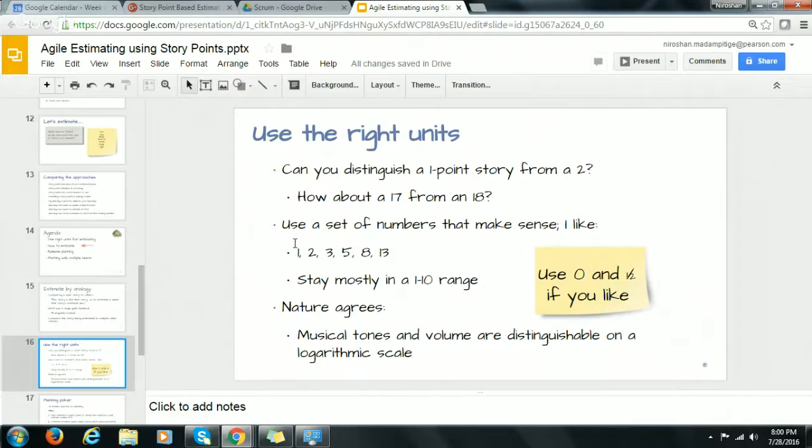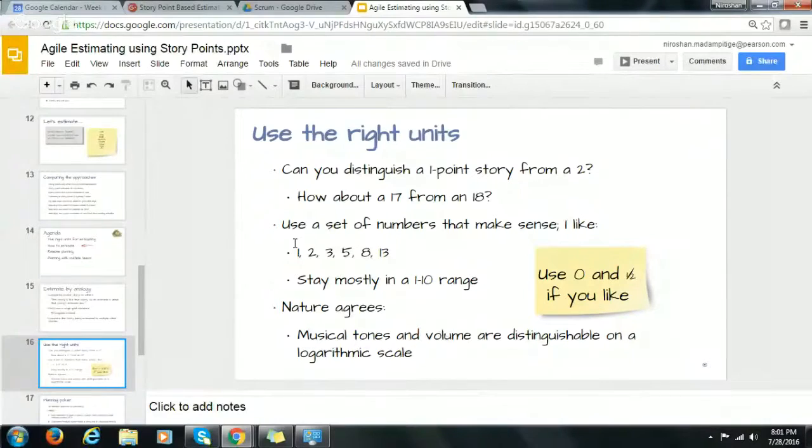That's why experts suggest if you want to customize your Fibonacci index, go ahead, if that helps. For example, you could use a half in between 0 and 1. That allows you to measure stories in between 0 and 1. If it's 1, give 1. Otherwise, say half, smaller than. Using Fibonacci indexing or t-shirt sizing would allow you to agree on the nature, and we believe everything else operates in a similar manner.